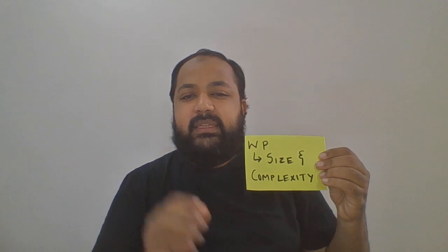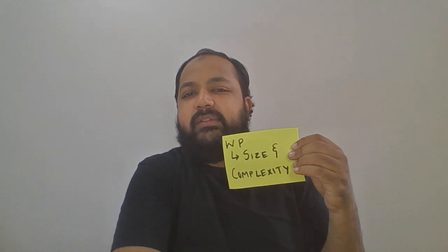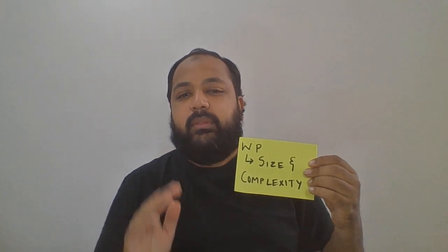The work package is something, the size of which is defined by the complexity. It is a manageable chunk. You don't want to do a lot of subdivision, because managing that will take a lot of effort. Something that's easily manageable, just divide to that level. That's a good level for making a WBS work package.